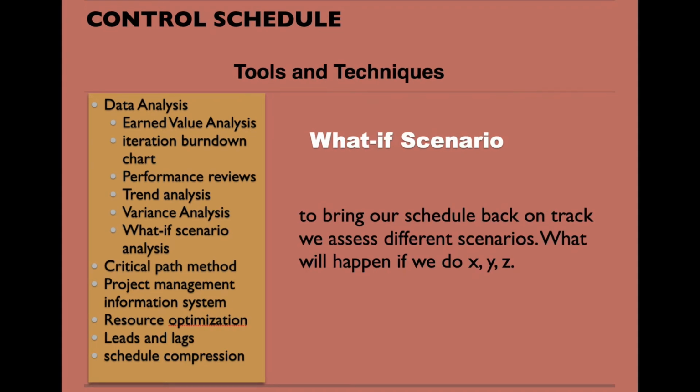What if scenario we have discussed before. This is a tool and technique in data analysis that we use to bring our schedule back on track. For example, in the middle of the project we came to know that we are behind schedule. Now, to bring our schedule back on track, we use what if scenario. So we assess different scenarios. What will happen if we do X, Y, Z?